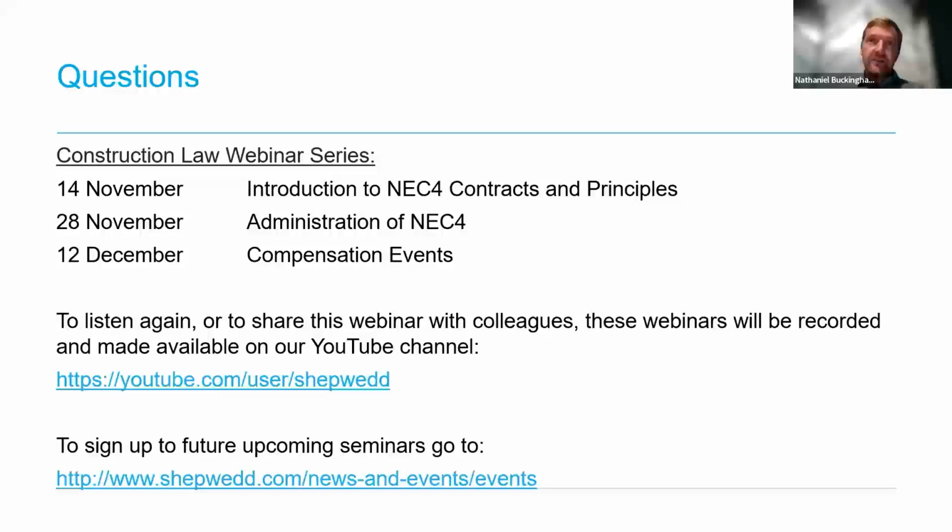That doesn't mean you can't do it in the UK. I think the reason for that is, obviously, in the UK, you always have the statutory right to adjudication. So you would need to introduce dispute resolution boards through a Z clause that captured how those two things would interact. In other words, you may have a dispute resolution board that can operate, but you would also have to allow adjudication at any time.